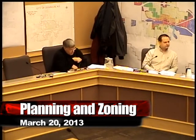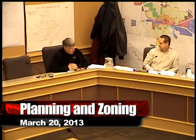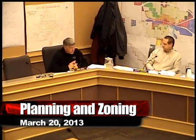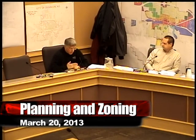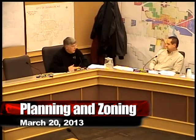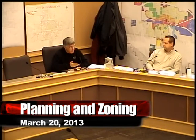Any other discussion? Mr. Krieg? Mr. Chairman, and, not just pointing this down to the park board, but I've got no problem with what they proposed or the developers. But I think it's in everybody's mind that we look at the 3-month, 6-month, 9-month deal, and reality is it's probably double or triple that. So any developments that are taking place, you need to double or triple the time frame just because of Parks and Rec, the city, the staff.